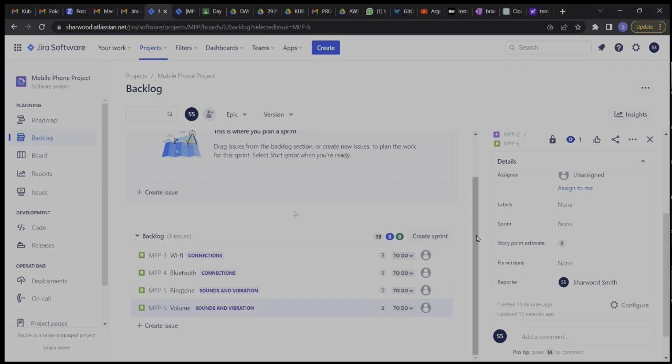Are we sure? We are, but it's just not assigned once again. Good. So now it has not met the definition of ready because we have not assigned it. If we say we are working on it, it means everything is said. We know who is working on what, and everybody has understood. We have linked it. So because we have not yet assigned it, it means it has not met the definition of ready. The definition of ready means okay, we can pull it to the sprint and click start, right? But now we cannot do that because who is working on what?